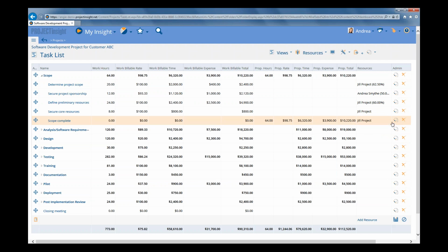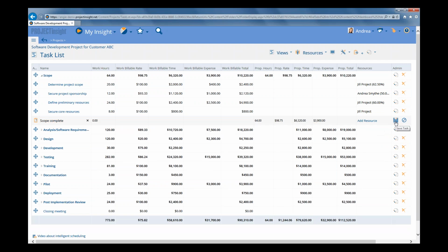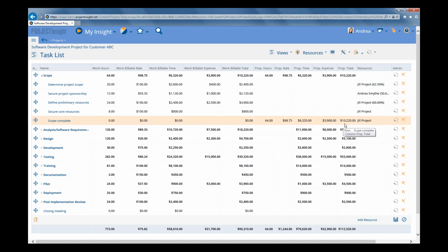And, even in this case, we could say, let's round this up. Sorry, here, let me change that. You might want to round this up to $10,500 or maybe even $11,000. And you may also want to build some contingency in at this point. So maybe your practice is to build in a 10% contingency. So you can do that as well.